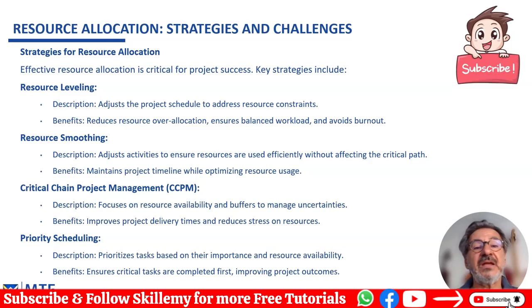Priority scheduling prioritizes tasks based on their importance and resource availability. For instance, you can use this at the same time that you use the critical path method. You define the critical tasks, those will be the prioritizing tasks, so that when you are allocating resources, you know that you need to allocate them probably in a priority way to these tasks.